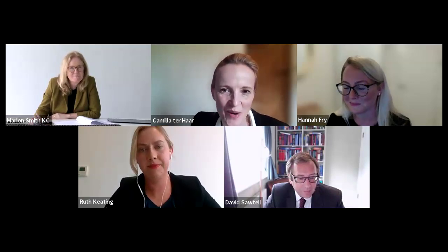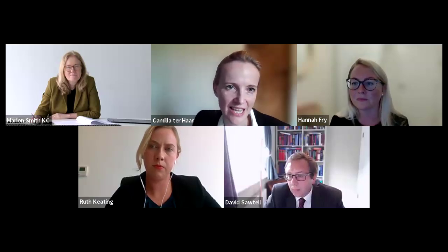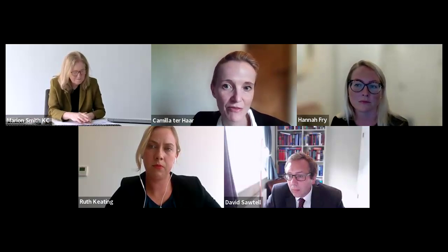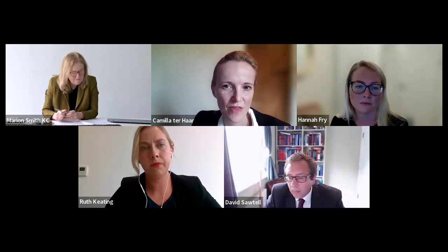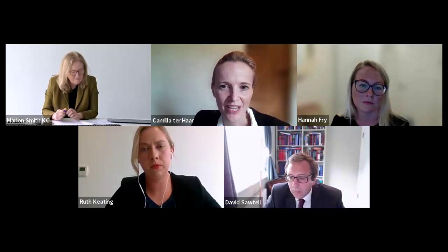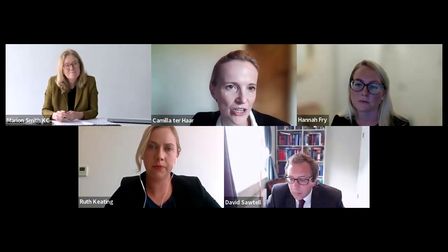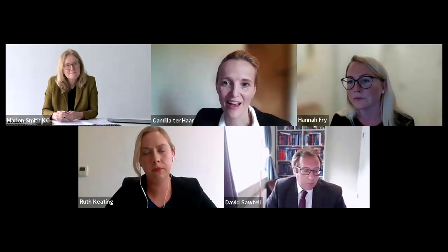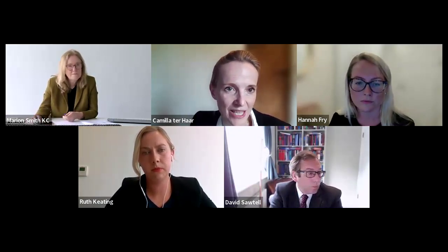Thank you, Marion. This is a short one first. So in the JCT 2024 design and build contract, there is now space in the contract particulars to set out specific exclusions or types of sublimits. So the limit on the amount of coverage for a specific type of loss within the overall level of the professional indemnity insurance cover. And this is a change to what was previously included, where it was assumed that the only sublimits which applied were in relation to pollution and contamination. And this change reflects the market where insurance for claims in relation to, for example, cladding or fire safety can be offered as a sublimit.